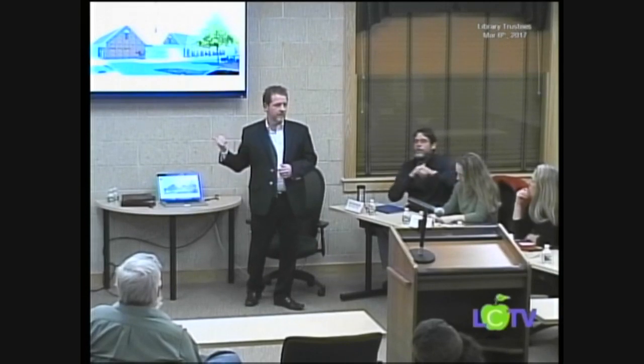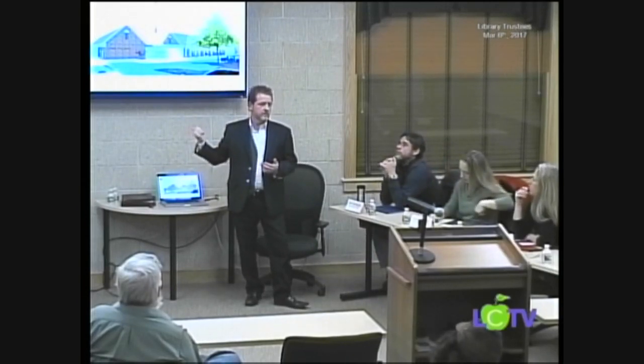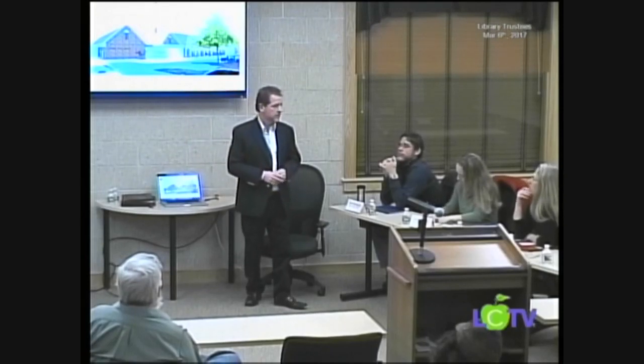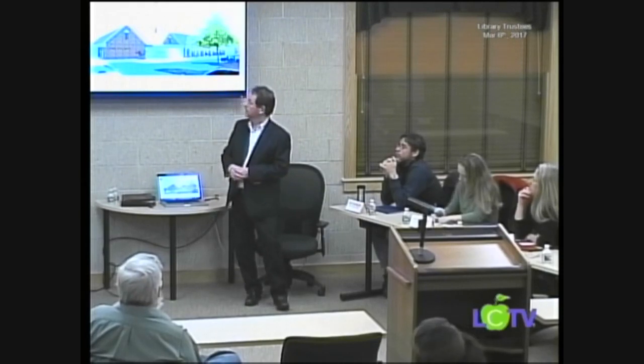Sure. Okay. Creating another floor up there or a mezzanine becomes complicated for getting people in and out of it, still need to comply with the code. Right. And once you create floor space, it really has about the same value as the floor space on the other floors. Sure. So if I add another floor in there, I'm just going to add another 20% to the cost of the building. Yes, okay. But mechanical spaces and so forth can go up there pretty easily.